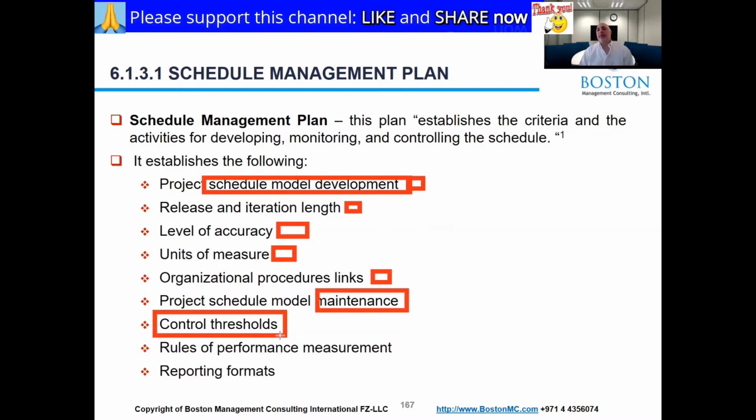Okay. For me, if you think your work is going to be significantly impacted, let's say I only gave you a 5-day task, I may want to set rules that if you ever think that your work is going to be delayed by, I think for everybody it's different, right? If you have a 5-day task, if you think you're going to be delayed by a day, even a day, I want to know.